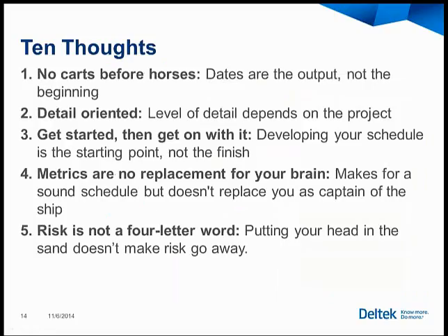And like I said, these are two key slides, both to this session and to the whole series. No cart before the horse. Dates are the output of CPM, critical path method scheduling, not the beginning. This is true at S1. This is true at S2 for the schedule critique.